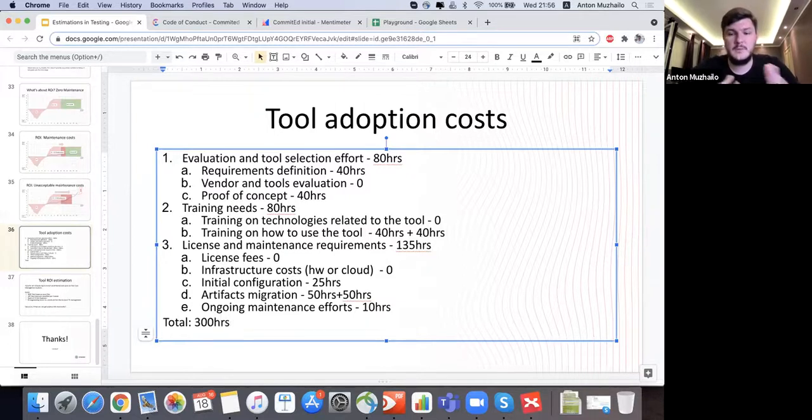So it will be like 300 hours roughly, which, if we divide it by 8, my brain is not working already, so I would use a calculator. It will be 37.5 engineering days. So this team of 10 engineers can complete it if we divide it by 10, but they should also actually work on their real project, right? They should continue to do their regular tasks, correct?